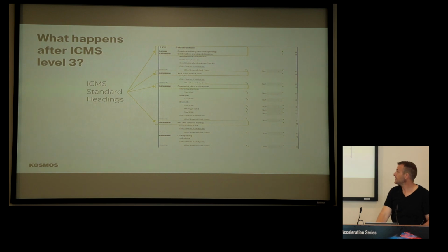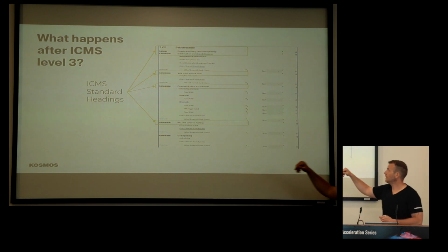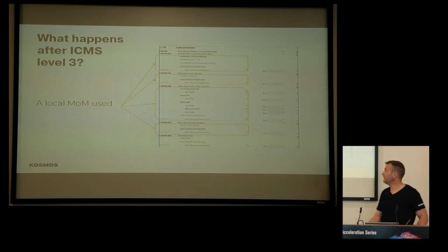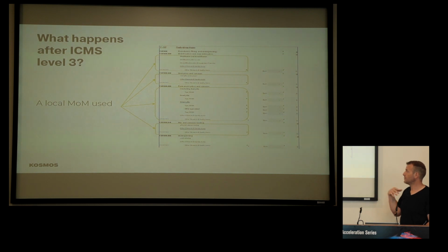And so ICMS is a standard structure, but just on the headings down to level 3. And it's important to understand that. That coding structure here at the beginning is a standard from ICMS. We just take that directly. So again, in the future, that coding structure will hold true for us when we begin to get more efficient in analysing the data. The levels beneath that then come from your local method of measurement, whether it's ARM, NRM, or whatever local method you use.